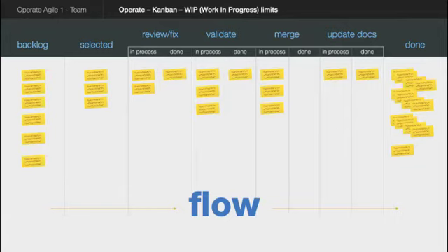Visualization is an important aspect of Kanban as it exposes process operations and problems and stimulates collaboration to continuously improve the system. Each process step sets its optimum WIP limit, or work in progress limit, to avoid waste due to overburdening. This is a very easy technique to visualize your value stream and have teams use this technique to show the kind of work that they're doing and thus improve it as they go along.